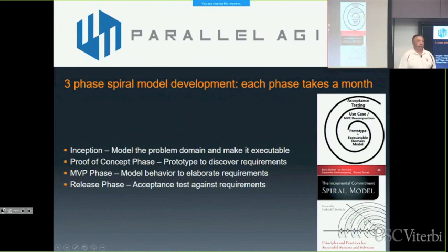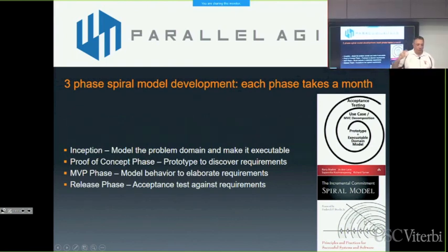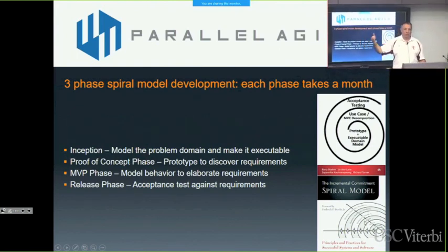The way we got this from our student projects is that we were doing these projects across multiple semesters. You were in this 3rd semester maybe of the mobile coupon project, 2nd or 3rd semester, I don't remember. But on the student projects, we had students working between 5 and 15 hours a week for 1 semester. If you normalize that out to full-time 40-hour weeks, it collapses down to about a month. That's where the month comes from. It's not a 1 month hard time box.